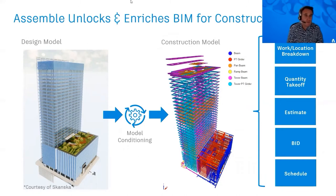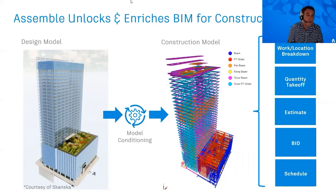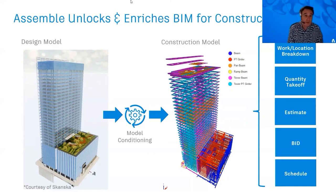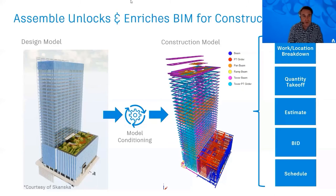Those design models may not represent the way you're actually going to tender or physically build the project. Your structural model might need splitting between a groundworks contractor, a concrete contractor, and a steel fabricator. MEP might involve separate contractors for air handling units versus electrical. Assemble takes that already-measured geometry and breaks it down into different sections, allowing you to add additional data — for example, an NRM cost code — colorize the data, and make it available to the site team in different tender or construction packages.